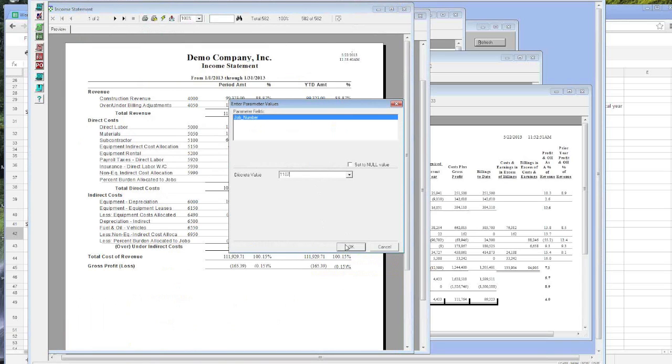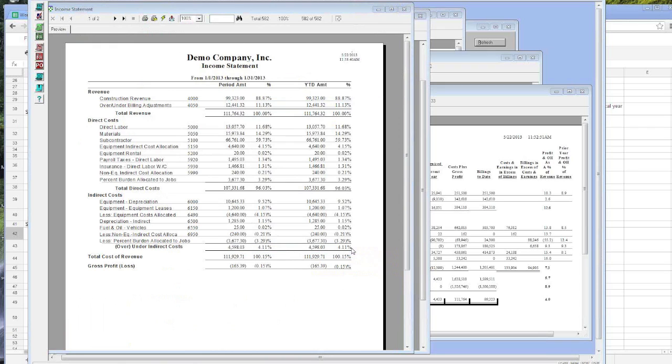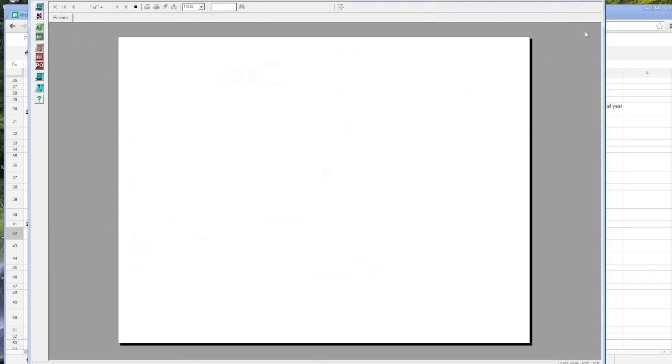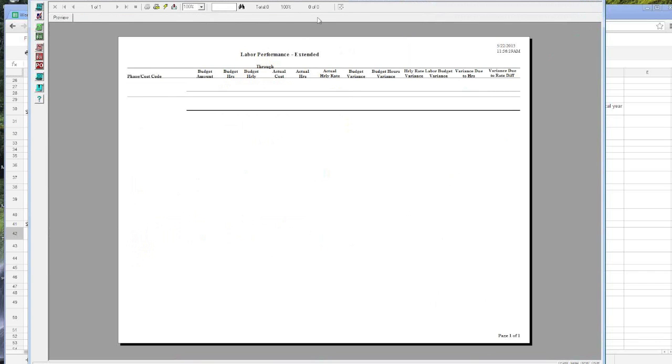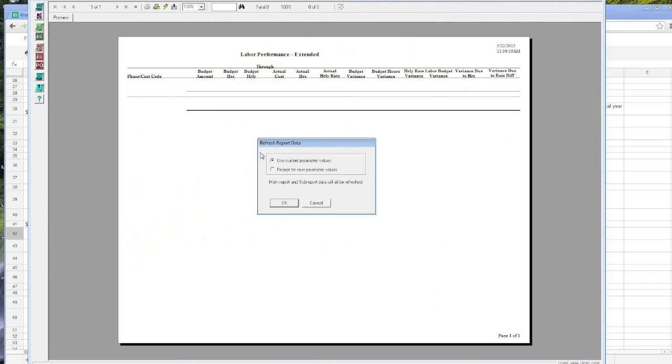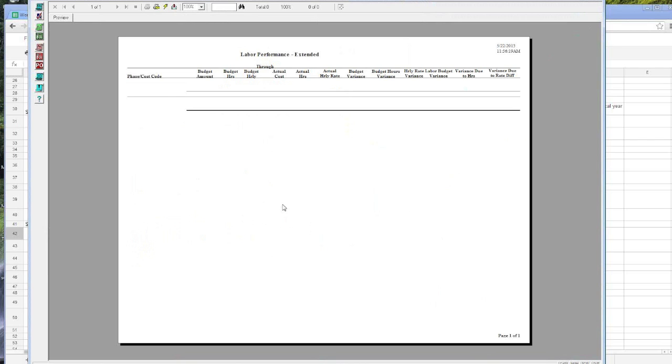So, from a material standpoint, a subcontractor standpoint, it's a lot more straightforward. They're really direct costs. So what did I anticipate? Did I buy my job out? Did I sign up for purchase orders and subcontracts at the beginning of the project, or as much as I possibly could? Did I track those costs? Did I create my accounts payable invoice from those purchase orders and subcontracts? And then you've really done what you can do, and I monitored what's out there and what's coming in, that kind of thing. So you've done what you can do on the cost side, or on the PO and subcontract side.